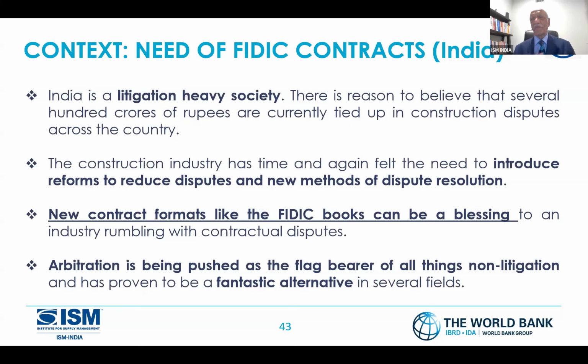New methods of dispute resolution. Arbitration is being pushed as a flag bearer. Firstly, they'll say, guys, we'll handle the dispute through the engineer. If that doesn't work, then we have the DAAB. If that doesn't work, then we can go to arbitration. So this is how they try to cut short the cycle time.